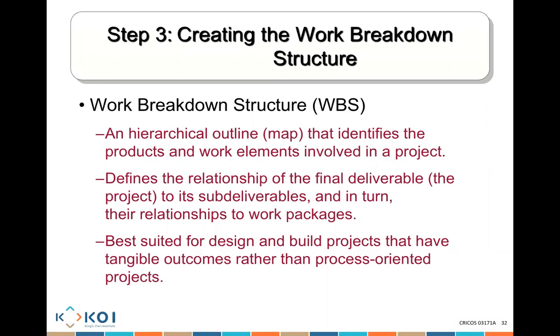So my recommendation for you is very simple. You go and understand what is actually needed in terms of the scope for your assignment or your project or whatever it is. You create a detailed work breakdown structure. From that detailed work breakdown structure, you assign people to all of these work packages. Because you're assigning people to these work packages, you can say how much each person is going to get paid. And because of that, you'll be able to get the right outcomes. So that's something to bear in mind.